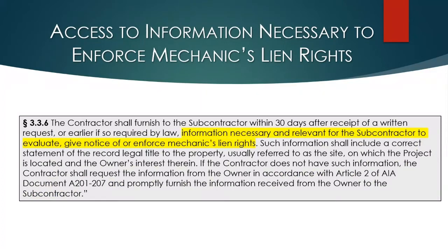What should you do in Florida? You would want to modify this language, and I would suggest that you require the general contractor to record a notice of commencement and also to maintain it and to not let it expire during the project. We see that happen sometimes, and we get to the end of the project, sub comes to us, wants to record a claim of lien, and we see that the notice of commencement has expired, therefore it's no longer effective, and your lien rights don't relate back to the date the notice of commencement was recorded, which can be bad.